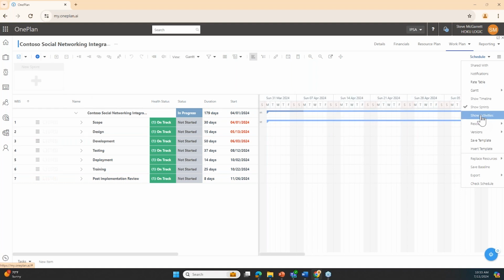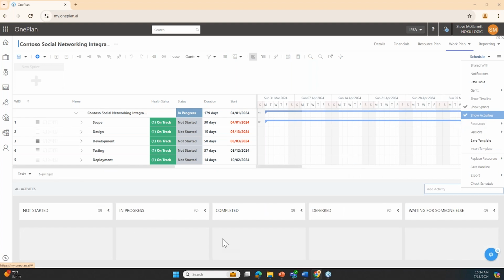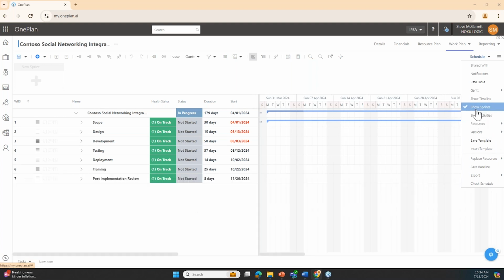We're also, and I think this is of interest to people in organizations with complex schedules where they don't want to have everything land on everybody's timesheet, able to show activities that aren't necessarily ever going to be something that somebody's going to want to put time against. So you think about this, you've established a task, it's got 600 hours in it, you want people to bill against that task, but you don't want to have them see things any deeper than that. However, you do still want punch lists that enable you to track what people are doing on these tasks. That's what activities can work for. I'm going to go ahead and close that out.